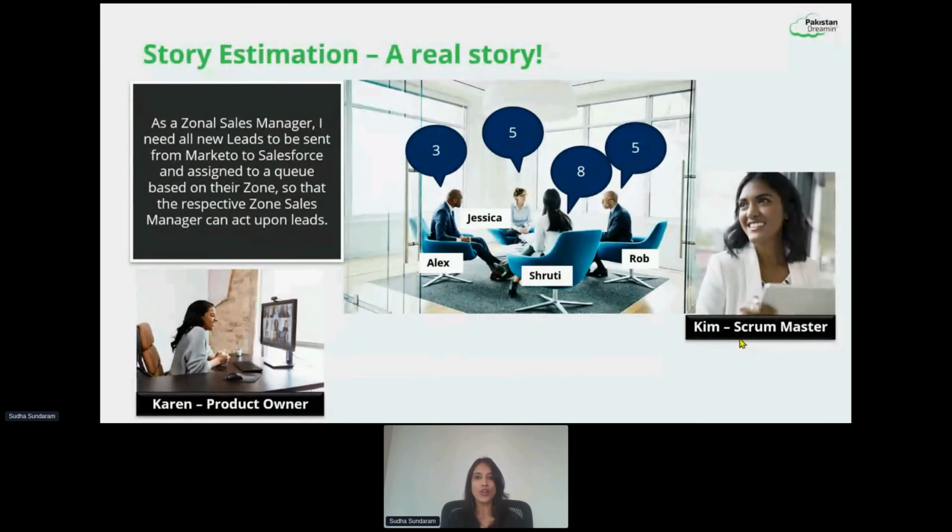We need to ensure there is interaction and communication among the team. We discuss, we share our perspectives and ideas, and finally, we redo this to arrive at the consensus. If you're not arriving at consensus in the second round, again, try to understand what is happening, like what the different perspective is, right? Once everybody knows what the different perspective is, then they're going to arrive at a consensus soon.